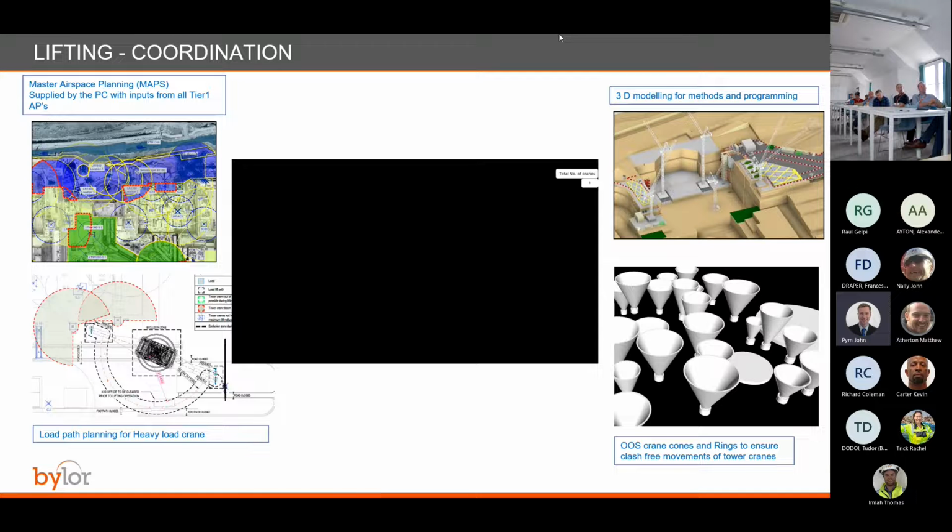Yeah, it's back to the original planning. This is where I'll get our gel free card on this one: the lifting team work hand in hand with the construction teams, because we don't lift anything unless we're told to. Ditto, we can't lift it anywhere unless we're told to put it somewhere. But absolutely, it's a thing. We can't just go and put things where we want to. So it has to absolutely be planned, because they lose walkways, there's scaffold, decking over large voids, staircases, other things. So yeah, we have to be very mindful, even more so as we're coming out of the ground.